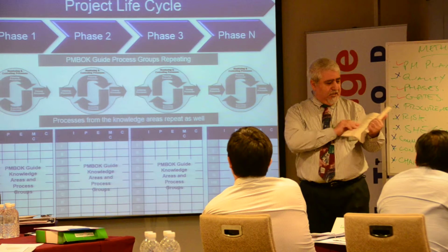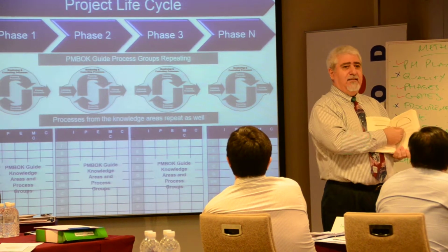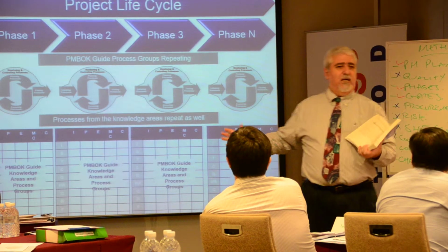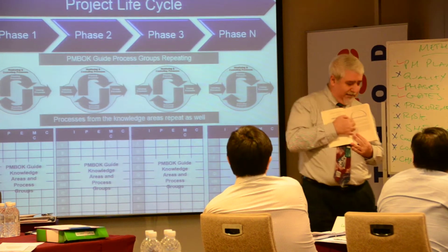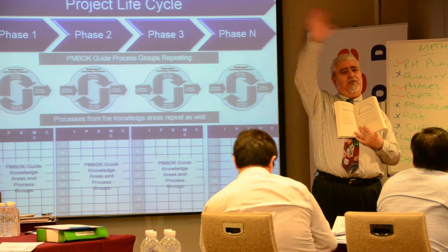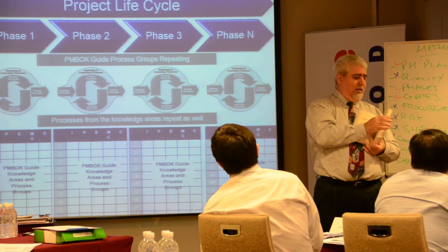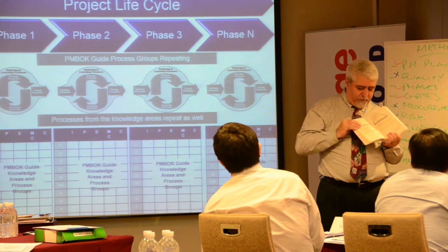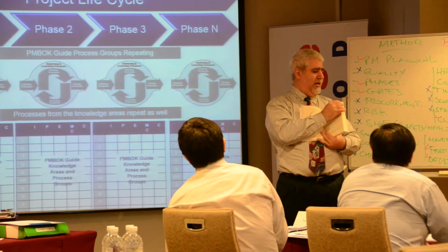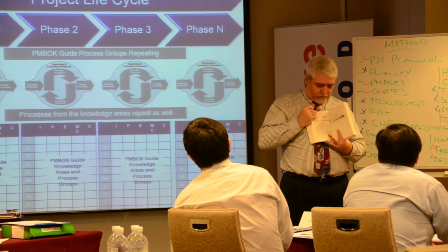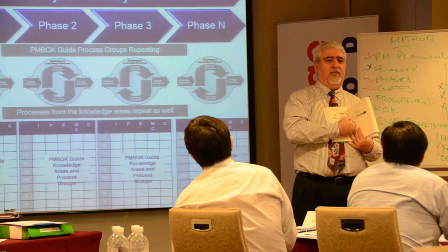So you have to plan, and actually I'll circulate this book, starting on page 112. I try to illustrate that initially, when you start your project, you will have the high-level plan. That's basically the high arch, you can see a little bit here. That is for the whole project. But then you start executing, going through the phases. Then if we come back to the next one, the same kind of process repeats in every stage. Technically it doesn't show everything here, but it shows the repetition that happens in every phase.